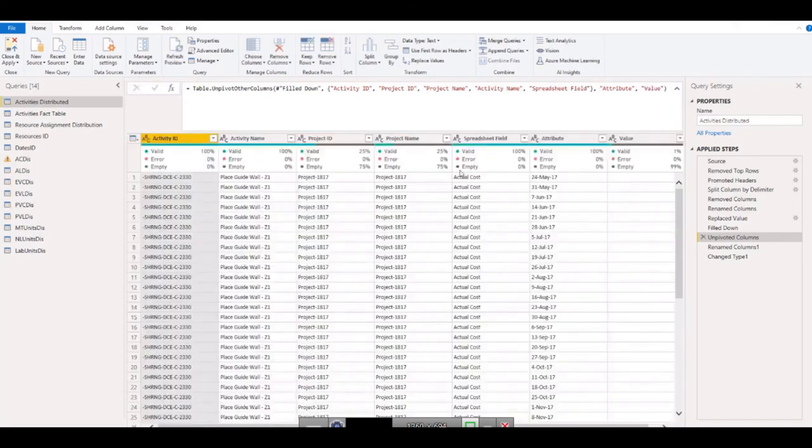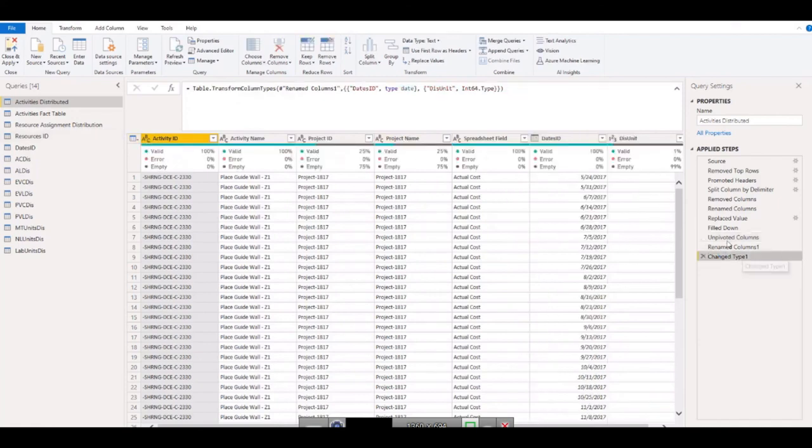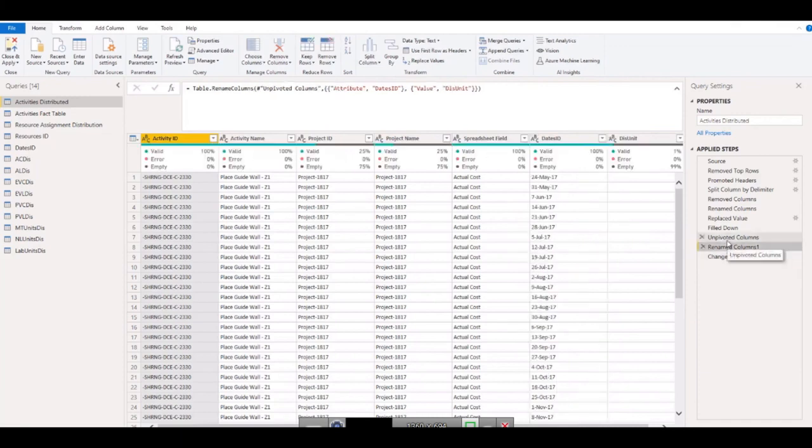See, the error is gone. Now you won't find this error in the date as well, because the date was giving an error for project ID and project name. So what I did, basically, there were 3 columns selected. Power Query was saying that other than activity ID, activity name and spreadsheet, unpivot everything in this sheet, so they were also unpivoted. But now we have said to include these 2 in your case as well, project ID and project name. This is the thing I did.